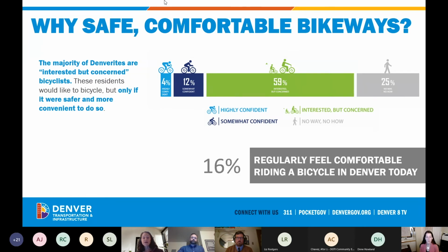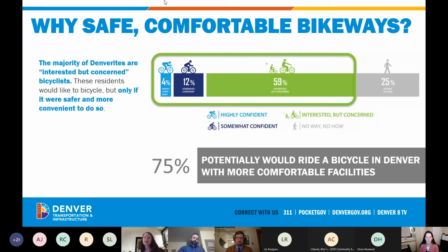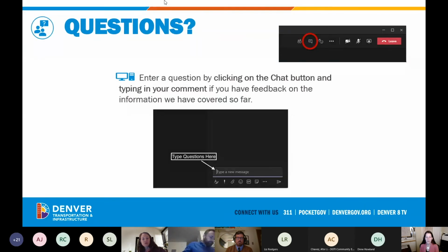So paving is done, like I said, we're trying to get a lot of paving done in a given year. And there are a lot of different factors that they consider when they decide which areas to pave. The most nominal reason is streets that haven't been paved in a while and how much wear and tear they've gotten. So some streets get more than others, just depending on how much traffic flows over them. But then they also have some logistical considerations where they want to do chunks of roadway at the same time. That works more efficiently for their crews. And then there's some other things like weather considerations and how far the concrete is going from one place to another. So they take those all into account and try to make sure that we're hitting up all of the city in an equitable fashion year over year. So that's the big picture of how we choose locations to pave. And then we look at opportunities like these bikeways to put in with them year over year also.